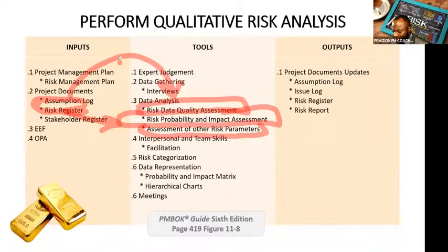Dormancy is like the sleeping giant. Dormancy is the period of time that may elapse after a risk has occurred before its impact is discovered. So the risk has happened, you didn't even realize the impact that it has because that dormancy factor is high. So a short period indicates low dormancy. A long period means high dormancy, asleep for a long time, if you will.